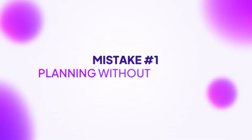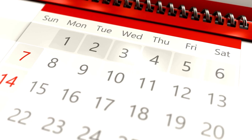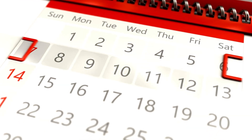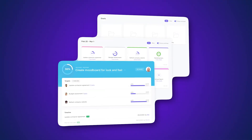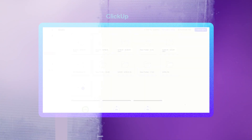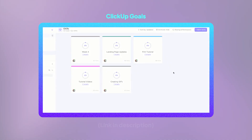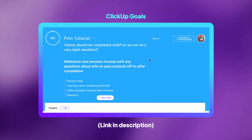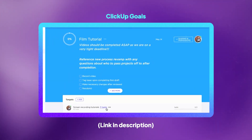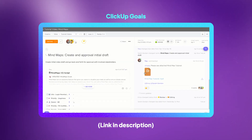Mistake number one: treating every task like it's equally important. This is a project planning blunder. When everything's urgent, nothing actually gets done. The fix? Start with your project's core outcome and work backwards. ClickUp's Goals feature forces you to connect every task back to what actually matters — no more busy work disguised as progress.